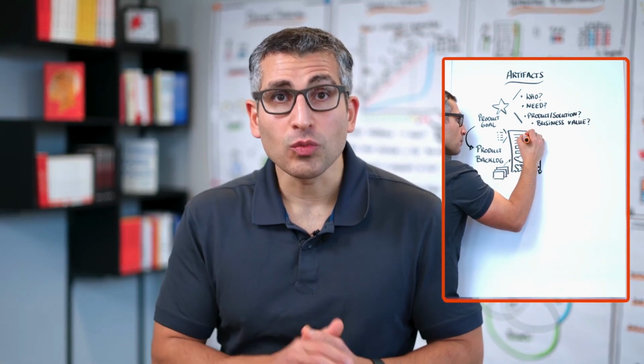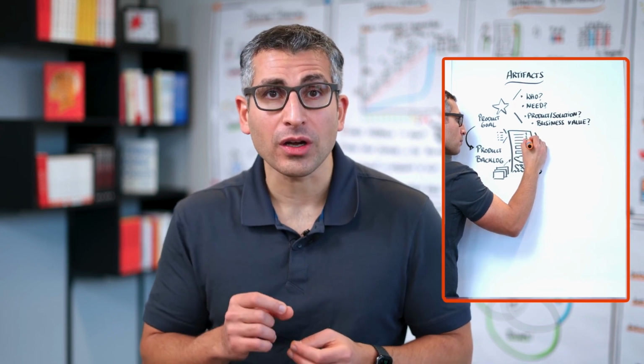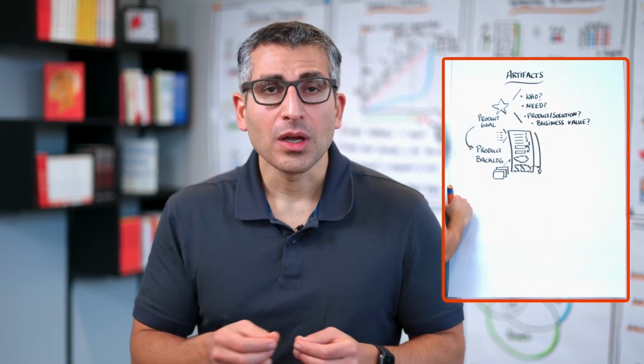Last but not least, we would want our product backlog to be estimated, especially the top part in that product backlog, so that a product owner can make predictions and that a Scrum team as a whole can also estimate how much work they take into a particular sprint.